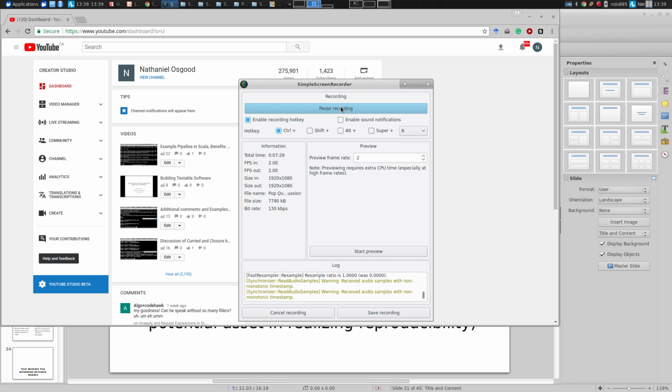And fundamentally, you know where they're coming from sooner because there's been less change, right? Imagine if you wait a month. You do a month's worth of work, all the different people in your team, before putting it all together. This is the strategy. It used to be called the Big Bang strategy. Okay, a Big Bang because people would be working for a while and then you put it together and it